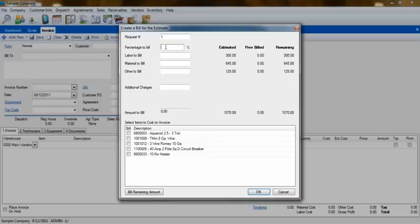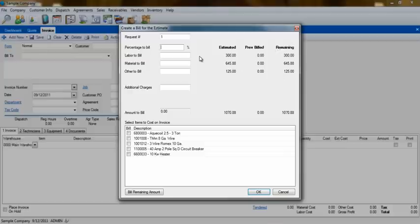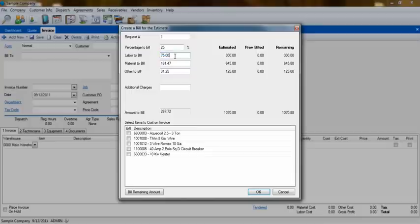When you enter a percentage, ESC will automatically calculate a percentage of each type of item on the quote. For instance, if you choose to bill 25% of the quote, then ESC will automatically fill in 25% of the total labor on the quote, 25% of the total material, and so on.